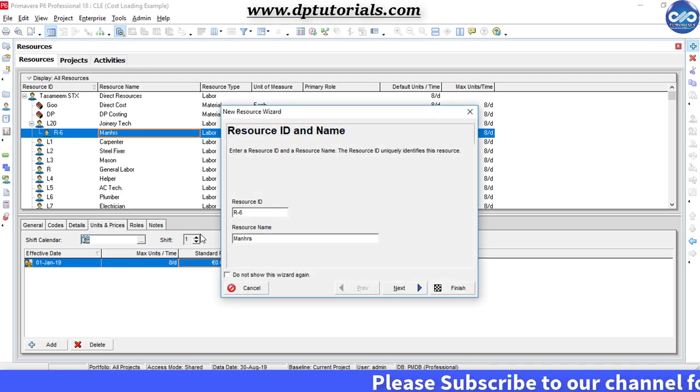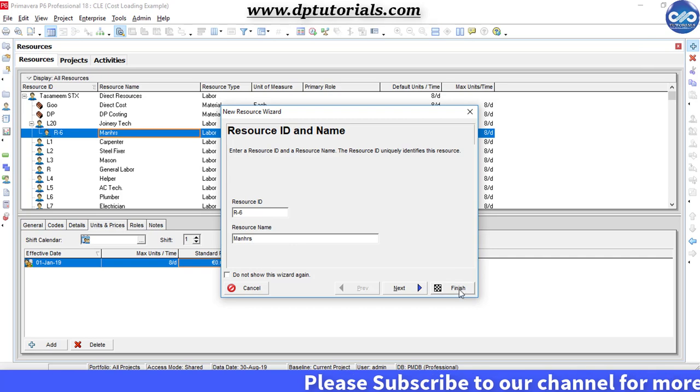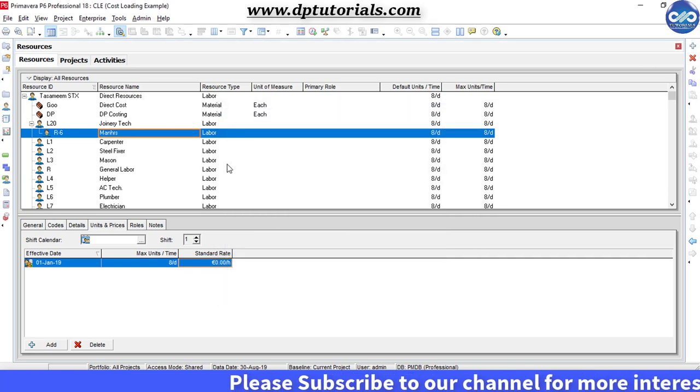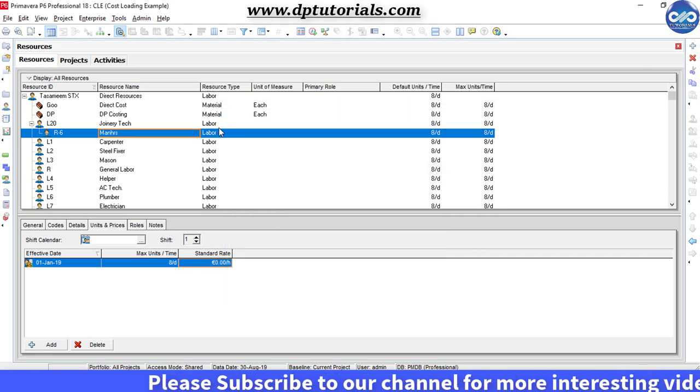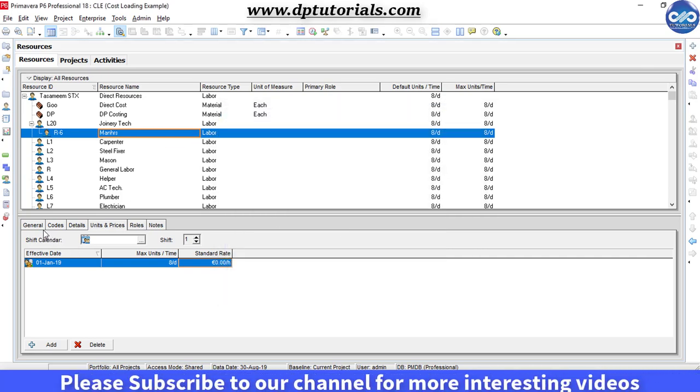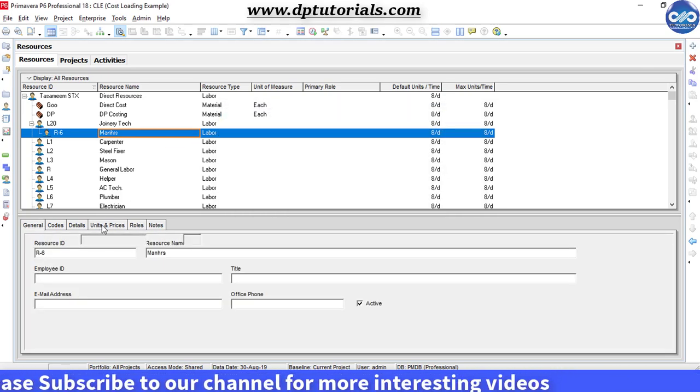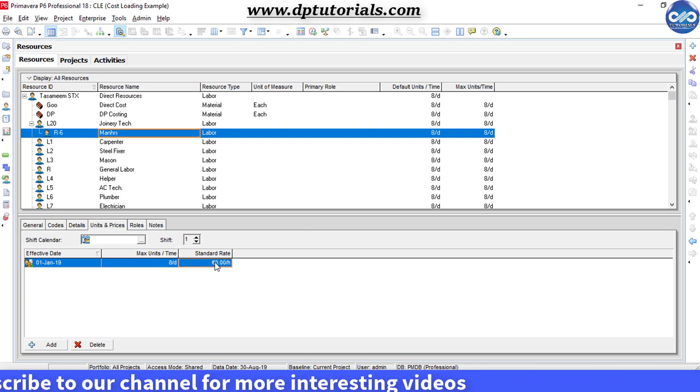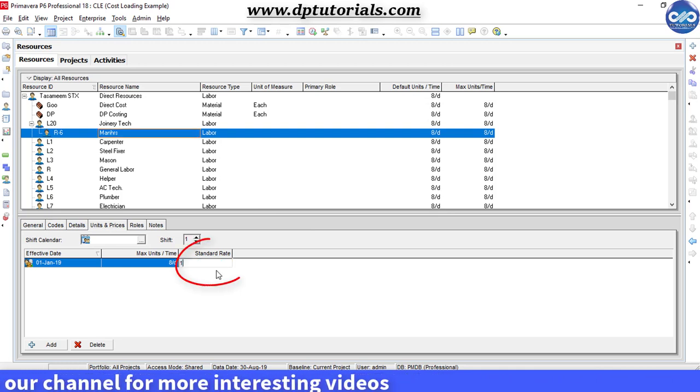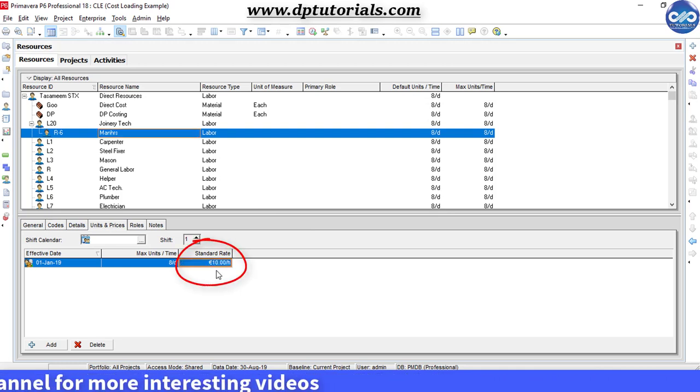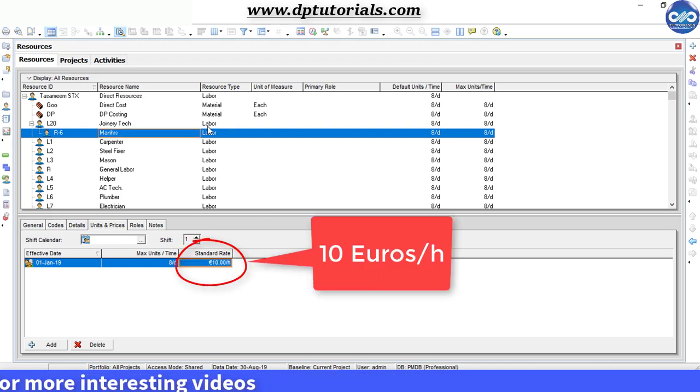I am creating this only for the purpose of cost loading. In the details section, go to units and prices and enter the unit price as 10 EUR per hour.